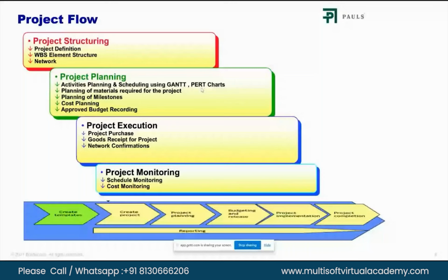As I told you, while date planning, we'll do plan start and plan finish. Once we input the actual start and actual finish in the system, your milestones would be triggered based on that. There is one WBS, construction of second floor slab, which is also your milestone. So once you confirm that this WBS has been completed, your milestone would be automatically completed.